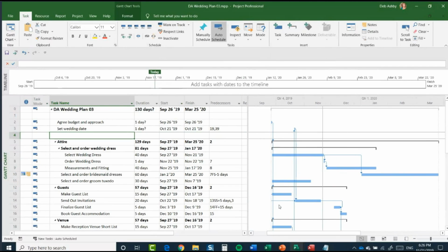What I'm going to move on to talking about now is milestones. And again, milestones are used to denote significant points or events in a project. A milestone in general has a 0 duration. So it doesn't have a 1, 2, 3 day duration. It can do, but in general, milestones are just a 0 duration marker denoting a significant point in the project.